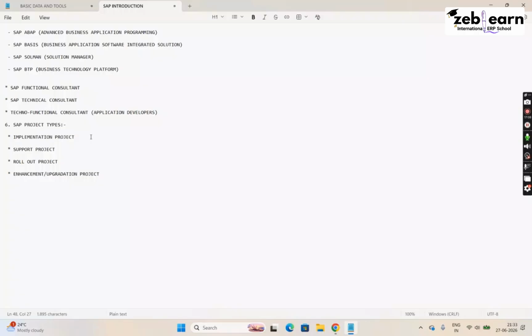So what that PMC company will do, CBRE will again contact big construction companies like L&T Constructions, Tata Construction Company, or maybe Shapurji Pallonji. There are many construction companies. So that is called as a main contractor. PMC company will only oversee the project, whether it is completing on time or not, what kind of material they are using, whether the quality of work is good or not. The PMC company is going to check that. But actually, the work will be done by the main contractor.